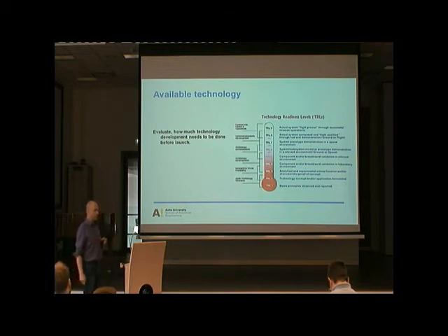So technology readiness levels is something, if you go to the bigger projects and ESA projects, they start to talk about right away. Is there a technology readiness for your subsystem? Technology readiness level means that you have a standardized, this is actually coming from ISO standard as well nowadays. Do you have readiness to actually do something? And this affects your price and development time and so on and so on.